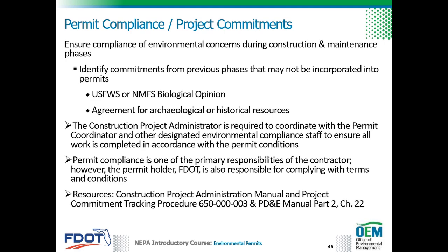This includes identifying other commitments developed in previous phases of the project that may not be incorporated in the permits, such as a U.S. Fish and Wildlife Service or National Marine Fisheries Service biological opinion, an agreement for archaeological or historical resources, and PD&E commitments. The construction project administrator is required to coordinate with the permit coordinator and other designated environmental compliance staff to ensure all work is completed in accordance with the permit conditions.